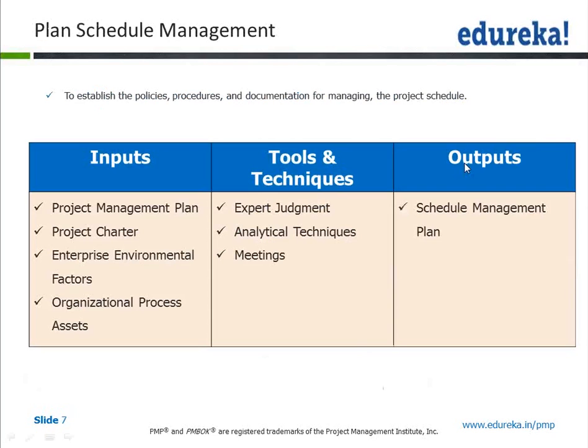So the first step is plan schedule management. You have to plan. Remember, the schedule management plan goes into your project management plan. The first step is to create the schedule management plan, that is how the schedule will be managed: policies, procedures and documentation for managing the project schedule.